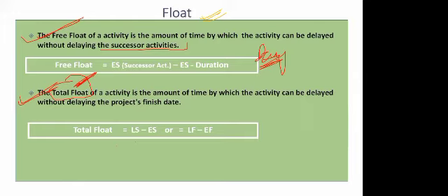Why? Because let's suppose you have two activities going on, one is critical and one is not critical, and you have limited resources. Now you need to think whether I should send them here or maybe here. Then always and always your priority will be the critical activity, because the other is not critical. It has some kind of lag.